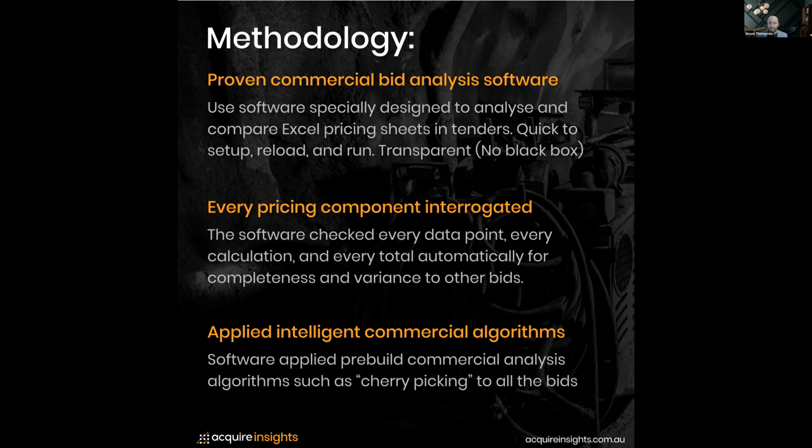The third bit is that we wanted to apply intelligent commercial algorithms. What that means is, if you speak to the CFO, they'll ask, have you done all these different types of analysis? Have you done a cherry picking analysis on all the bids? Have you done a normalization on the bids?